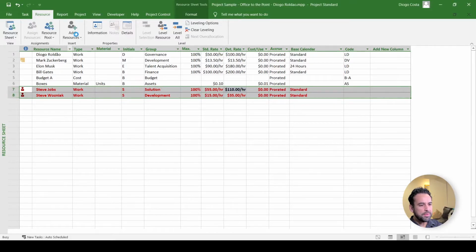place to inform it. During video 4, you will see me over-allocating people because I will put several tasks to work in parallel. It's not necessarily that you have to fix this unless you are strictly controlling the cost per hour per resource. If you need to control cost per hour per resource, you need to level your resource. So how to level your resource? Here on the screen, you have these buttons for leveling resource or leveling all. If you simply click on it, your project will magically level the whole file, and then no resource will be overallocated anymore in just one click.